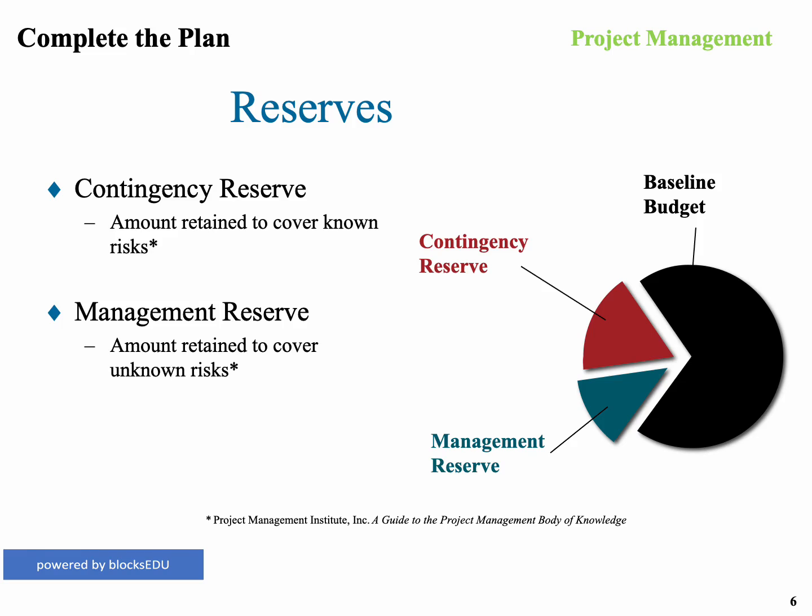That's a reserve. And then we have this other thing called the management reserve. It's the amount retained to cover unknown risk. This is your traditional contingency, the 5 or 10%. Again, this should only be allocated, not given. It should be reserved, whether it's 5 or 10% or whatever the management reserve is in your organization, but it shouldn't be drawn on unless it qualifies as an unknown risk. Now we have our known risk, which we have our contingency reserve for. If it's not part of that, then that's where we draw this other management reserve from, for the unknown risk. And only then. So what we basically have is our budget of, say, $1 million, but we don't add any extra money on that. We just reserve that money, and we only draw on it when these things occur, either a known risk or an unknown risk.